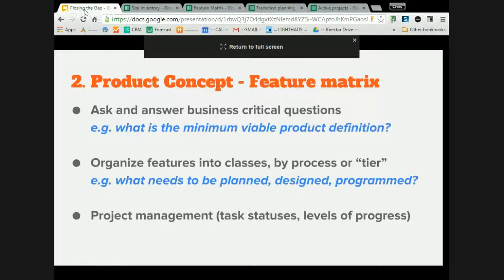It does somewhat, but there's still this sense of, no, we want to do everything now, in this phase, everything has to happen in this phase. And that everything could be hundreds of thousands of dollars of work and years of work. In 2 years, these technologies won't even necessarily be stable. Why would you build against that big of a scope? So we encounter this, and I'm often evangelizing the agile methodology, a more agile or more MVP approach, even on enterprise level or educational sites.